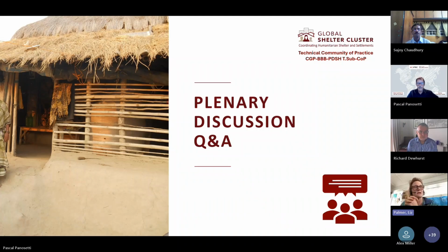And it comes back to Richard's PhD, which is not necessarily that the right people are in the conversation at the beginning, at the inception of the project. So you can have generalists or new business development, fundraisers, advocacy people, or even a technical specialist in education writing a proposal with a donor, and they have absolutely no idea how much the school's going to cost and how long it's going to take to build, and that you can't build in South Sudan during the rainy season, so we're going to need a much longer time period, and we're going to need 12 months retention on that because of the construction contracts.